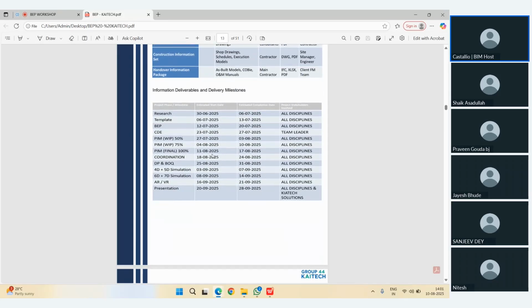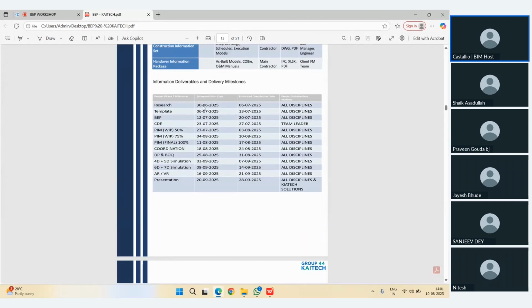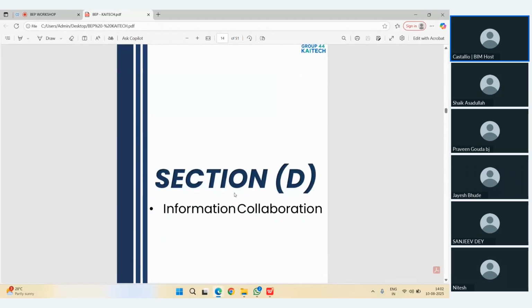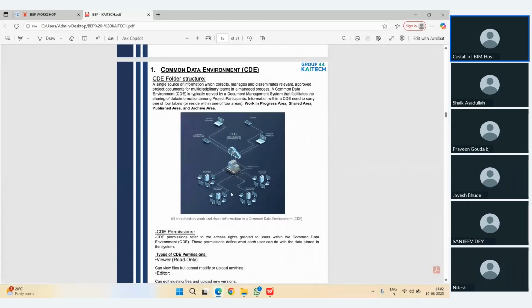Then this is the complete BIM schedule. We discussed this one, how the things can be set up. This is not the construction schedule, right? This is with respect to only the work in progress schedule for BIM activity or for the preparation of the BIM plan. Here you can see the information delivery plan only. Now again the more important: this is one of the most important parts of the BEP.